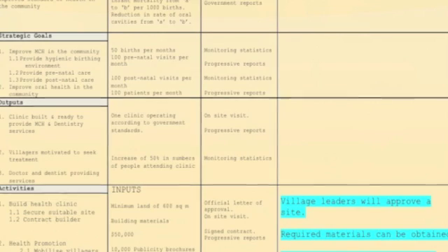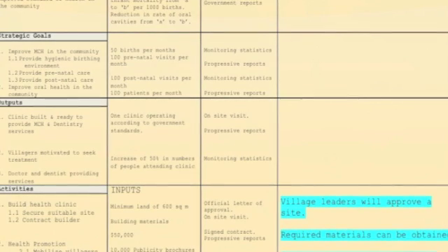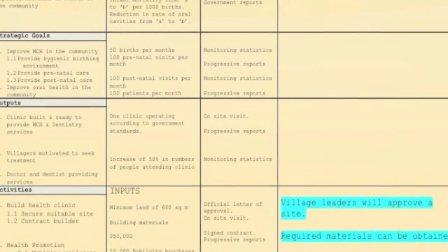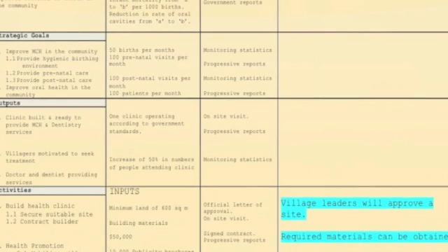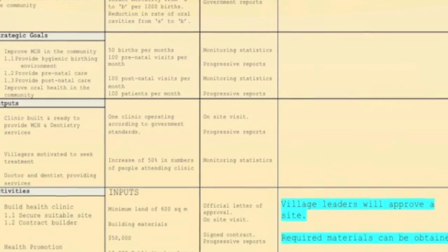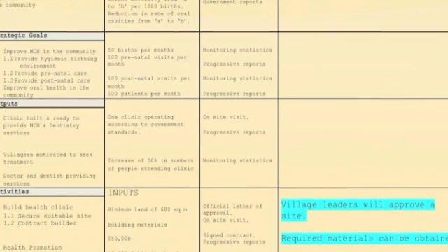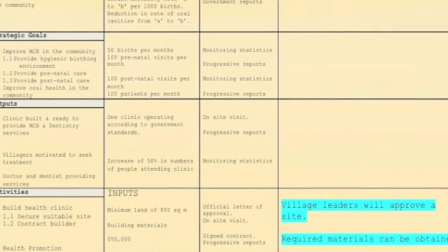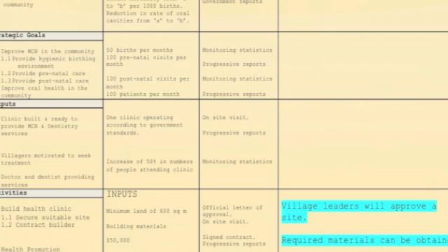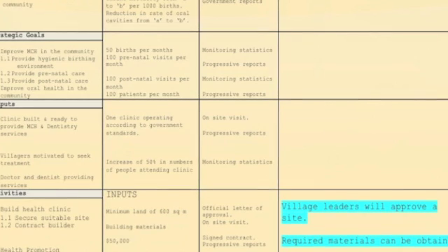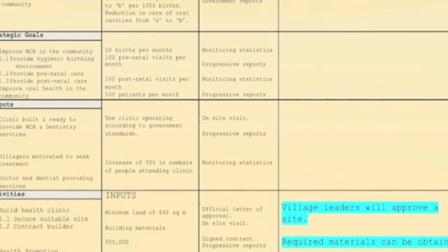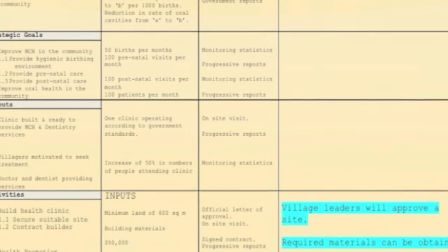For example, we've assumed the required materials can be obtained. That tells the potential donor that there's a possibility we cannot get the materials we need for the building. We hope we can, and we are working hard to obtain them. If we can't get them, we will possibly have to redesign the building to use the materials we can get. And that will have impacts on our budget, project timing, etc. Stating our assumptions thus points us to a number of implications we should be watching.